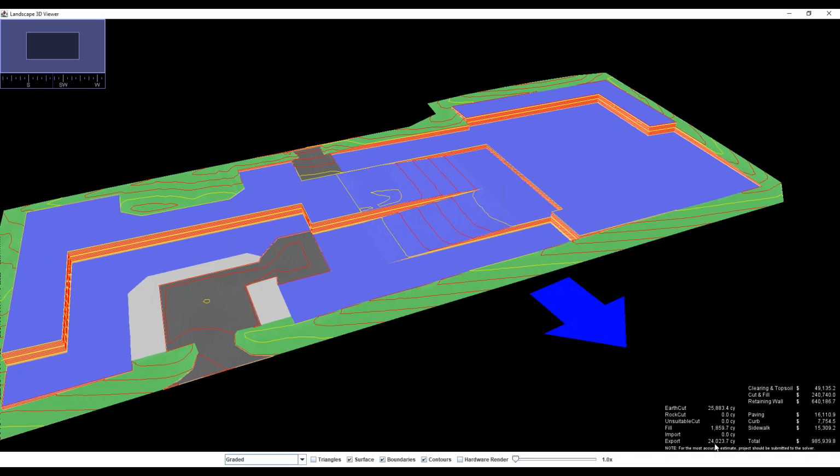And we came back to him and said, well, what if we switch the ramping around this way, and we were able to reduce walls and reduce import? And the architect was like, okay, that's fine. Wasn't the way we thought we'd do it, but we'll do it your way. And so that's an example of kind of showing them something.